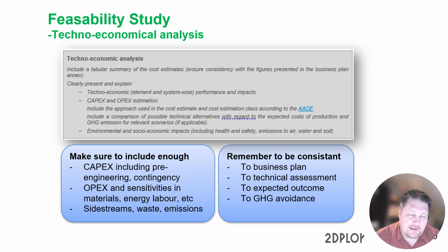The value of a euro today is not the same as a euro next year or the year after. So please also include escalation of currency over the time.